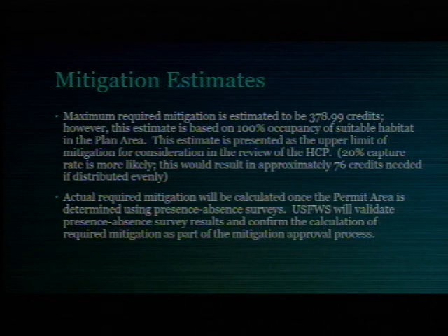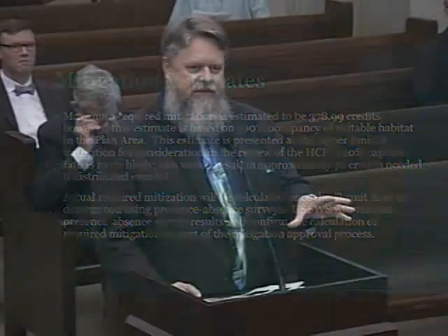The actual mitigation will be calculated once the permit area is all discovered by using what we call presence-absence surveys. And they go out in the field and set up these traps, and they set it out for about 5 nights and days.